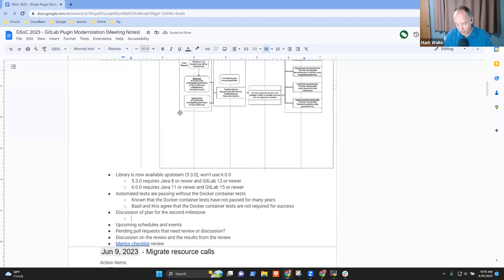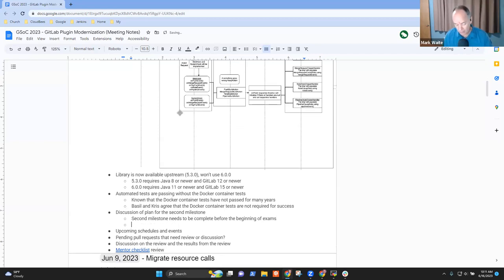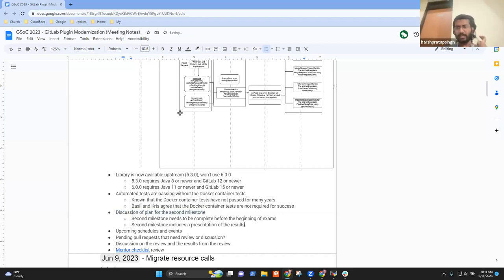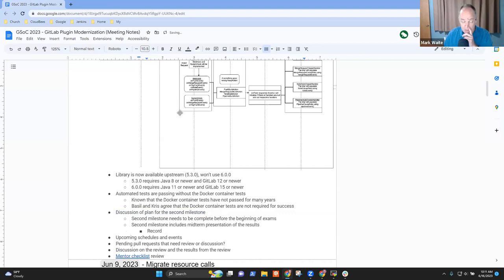The second milestone needs to be complete before your exams start, so we're not disrupting your examinations. And that second milestone includes some form of presentation of the results. When the second milestone is completed, we'll have to do a midterm presentation, because it will be the major chunk of the project. We'll probably have to do that as a recording rather than live, because the date of the live session is during the middle of your examinations.